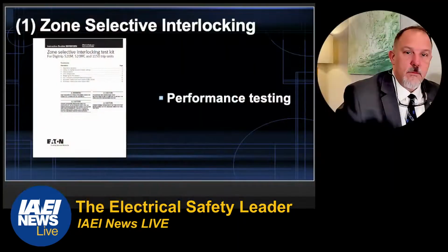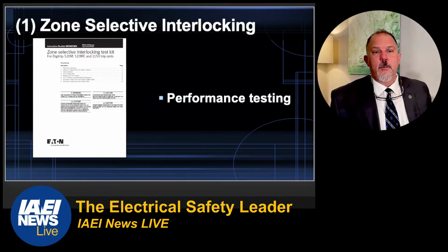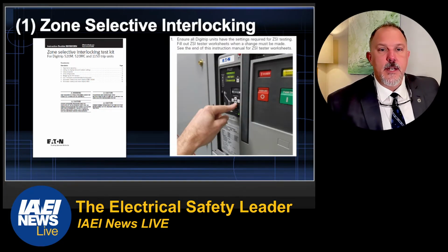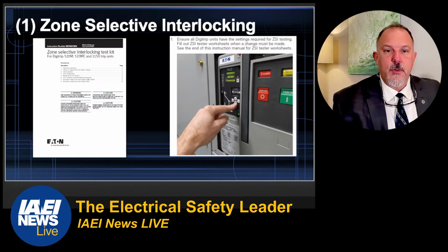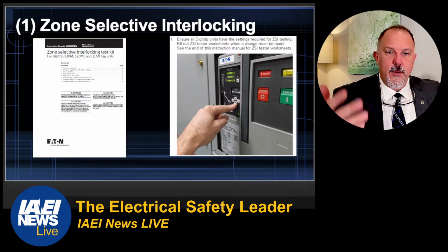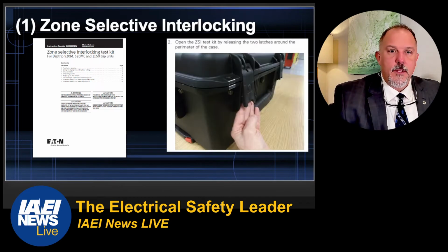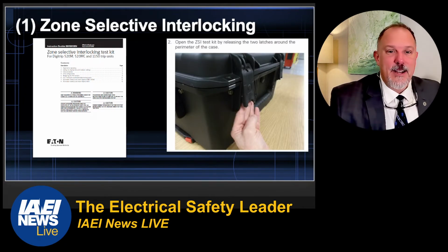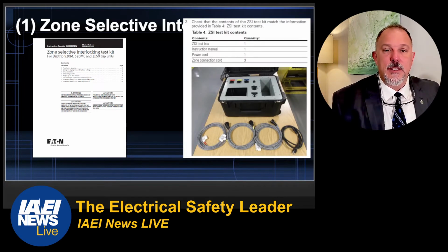So I'll show you this. This is out of the performance testing for a manufacturer's solution. They'll tell you to ensure that all of the trip units have all the right settings. They even show you how to open the case, and I'm sure they even show you how to plug it in, but this is a test set.